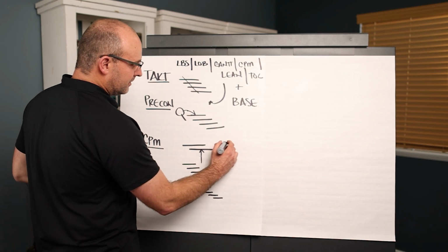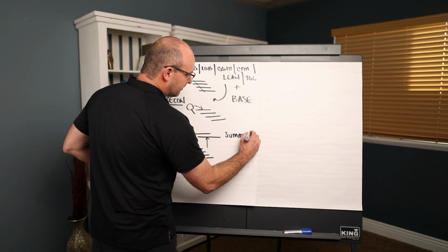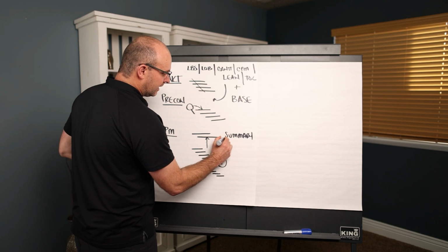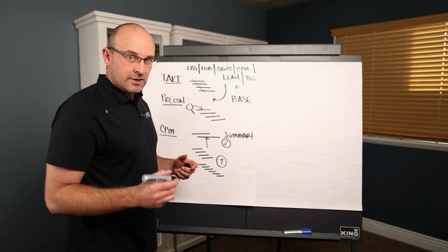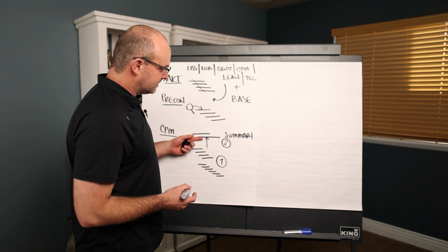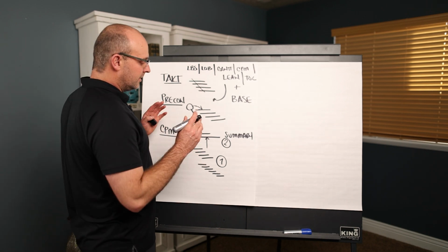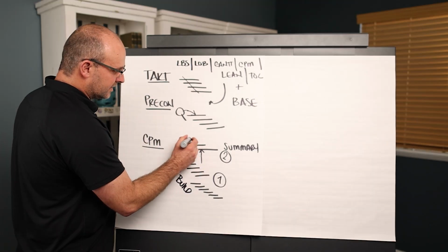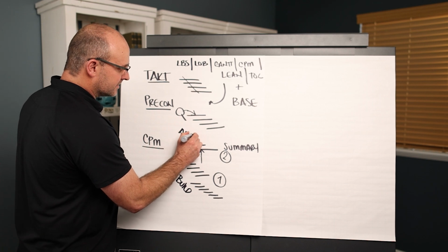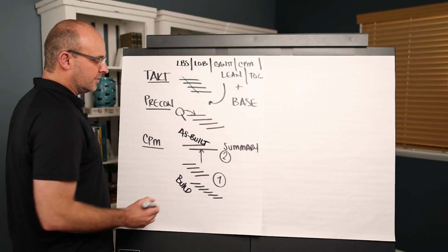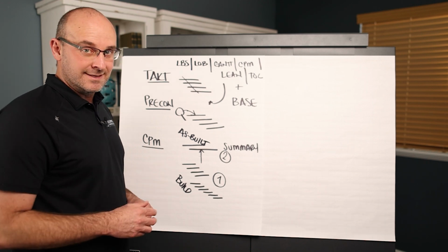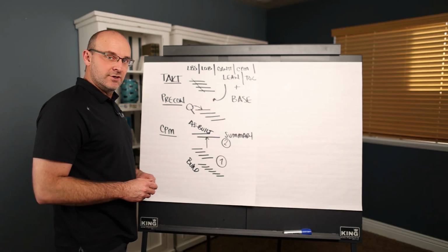But your CPM can be your summary for the project, and I always recommend doing the Takt plan first and then exporting out to the CPM second. There is software, notably Takt, that does this and automatically exports it, but at a minimum, this is how you build the project right here. And then with the CPM, this is how you as-built. CPM is only useful as an as-built schedule, and I would even argue it's not even worth that. But if you're going to use it, this is how you use it in the outline.